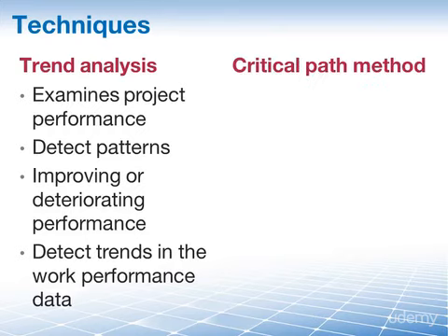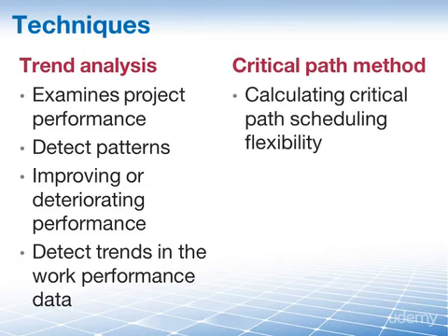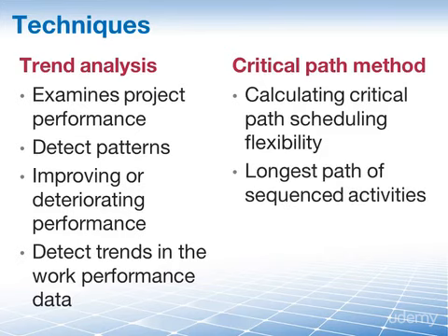Then we have the critical path method. This is a technique which we defined for you in the lesson on develop schedule. It's a method for calculating the amount of scheduling flexibility along your critical path. The critical path is made up of the sequence of activities that represents the longest path through the project and that cannot be delayed without delaying also your project finish date.